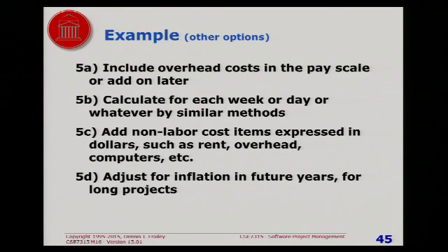And another thing you can do is if it's a multi-year project, you can throw in an inflation factor. Assume the average employee gets X% raise at the end of the year, and you could add that in. So with this basic structure, you can add in all kinds of stuff if you think it's relevant.